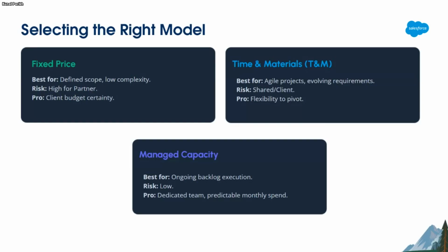Advantage for the client is that he knows what budget they are going to spend. So basically they can then utilize their other budget for whatever other spending they want to do, and they have visibility there. So fixed price typically is favorable for the client, but not for the developers or the partners. I mean, not that it doesn't work, it definitely works in terms of how you go about doing your estimations. But yes, there is a risk involved when it comes to the fixed price model.